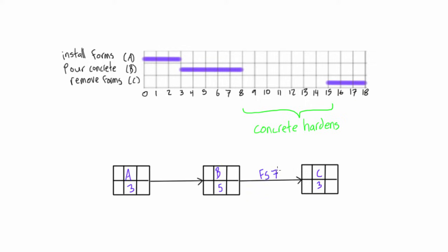Where we denote the lag by writing FS7 above the line. Now, the reason we have FS7 is because this is a finish-to-start relationship, but there's seven days of lag in between.